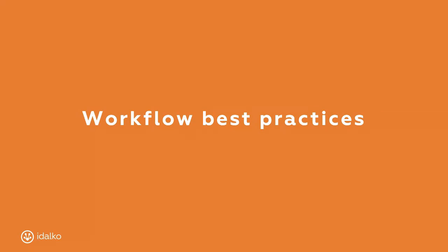Okay, so for example, Guillaume, do you know of any best practices that I haven't mentioned here that should also be mentioned when building workflows? We have a reply from Rob. Thank you. Naming transition, I often use to followed by the next status and back to when it's going back in the workflow. Yes, absolutely. It's a great way to distinguish between forward statuses and back statuses.